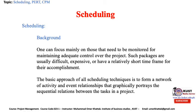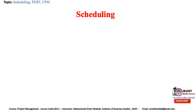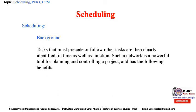The basic approach of all scheduling techniques is to form a network of activities and event relationships that graphically portrays the sequential relationship between tasks in a project. Tasks that must precede or follow other tasks are then clearly identified in time as well as in function. Such a network is a powerful tool for planning and controlling a project and has the following benefits.